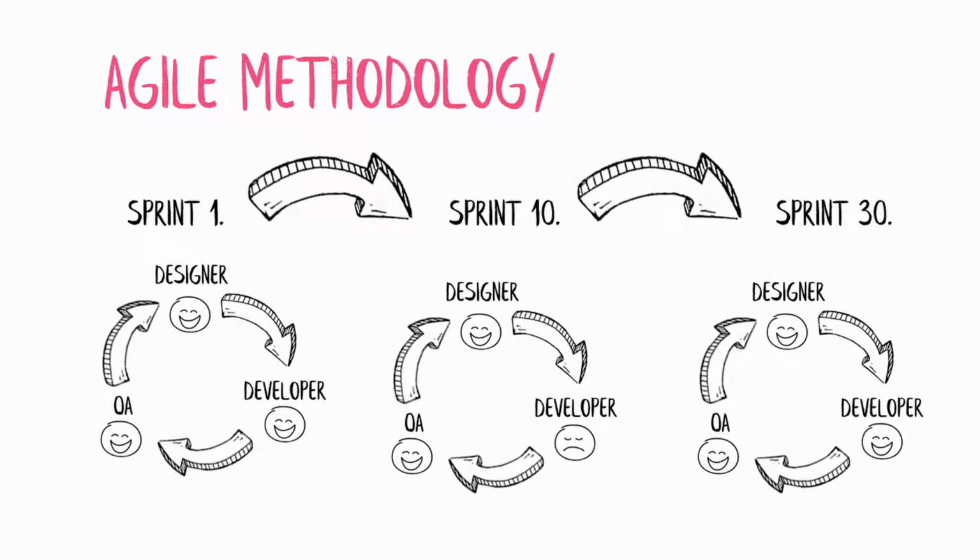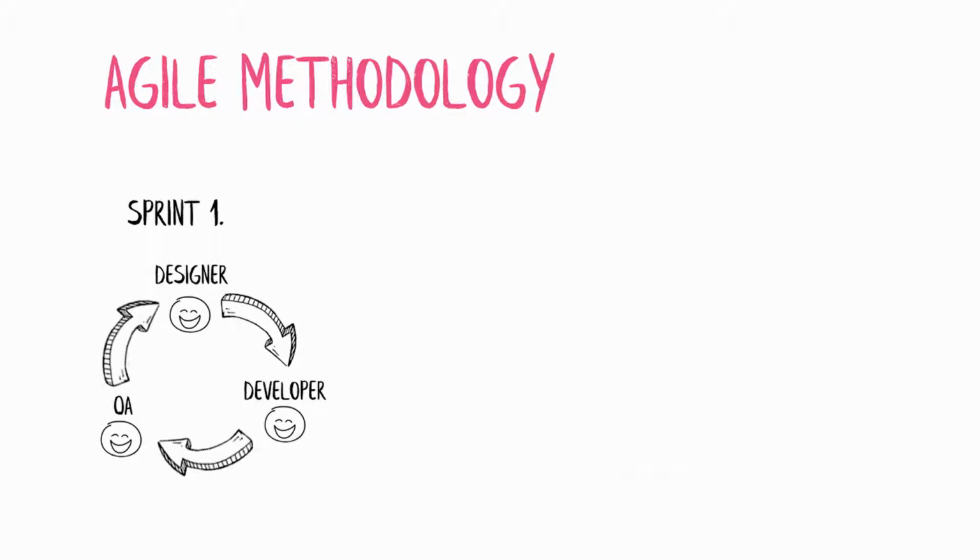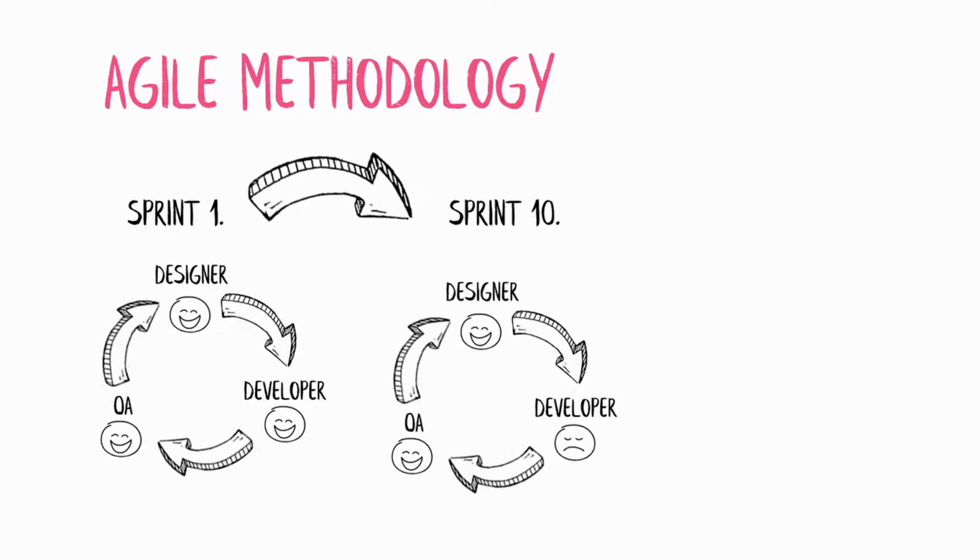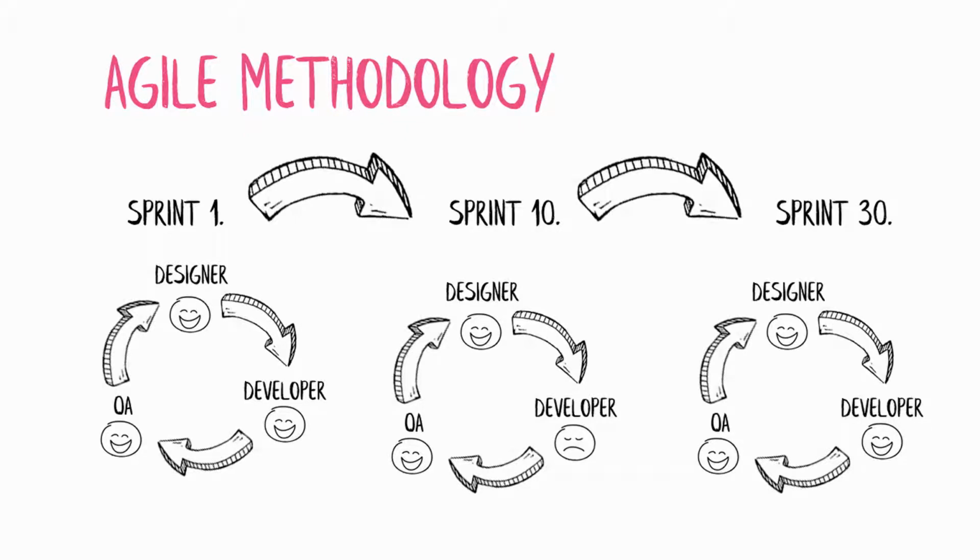And we can see here it's not split in parts, but it's split into feature building sprints. So we're starting with just a small proof of concept or minimal viable product. And on top of this, we're building features. Features are released after the sprints, so everybody is working together. Designers, developers, user experience, QA, everybody is working on a small feature. In this case, let's say it could be a product gallery, something like this. And we're adding to our initial product.